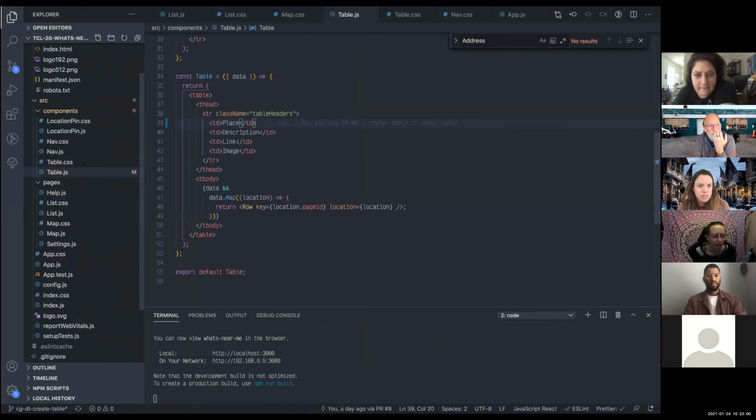The user flow. Have you heard the term happy path before? Is that something you've heard talked about? The happy path is, if nothing goes wrong, what's the path through that feature? The canonical example is a checkout flow on an e-commerce site. If the user enters all the data correctly and their credit card doesn't get declined and all that kind of stuff, what's the path through that? In some cases, it makes sense to code the happy path, and then in subsequent stories start to handle edge cases, like the credit card's declined or they lose network connection, and add those things on once you have the basic value added to the project.